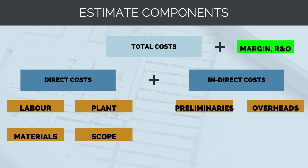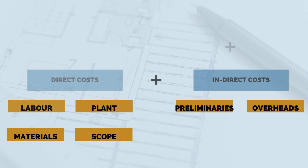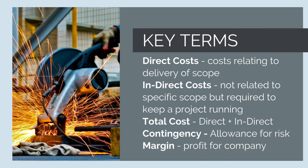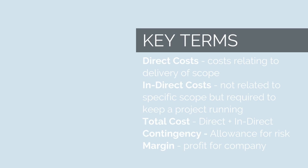We combine direct and indirect costs to get our total project costs. To this, we then add on our contingency — known as our risk and opportunity — and profit margin to get our price to the client. So the key terms are: direct costs (costs relating to delivery of scope), indirect costs (not directly related to a given scope), total cost (a combination of direct and indirect), contingency (allowance for risk), and margin (a percentage we add to our costs to work out the price we provide to the client).